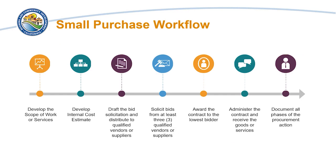The following workflow depicts the timeline of key events for small purchases. First, develop the scope of work or services for the goods or services being sought. Next, develop an internal cost estimate for the goods or services. After that, draft the bid solicitation and distribute to qualified vendors or suppliers. Solicit bids from at least three qualified vendors or suppliers and award the contract to the lowest bidder. Administer the contract and receive the goods or services. Last but not least, document all phases of each procurement action.